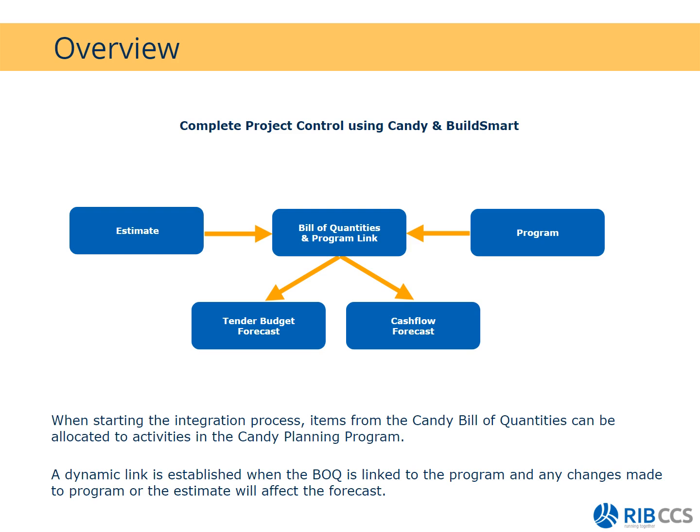I just have to point out though that on the estimate, if you go and adjust your final quantities, so let's say for Clearside, I had a total quantity of 1,000. I've adjusted my final quantity to 1,100. That means I will have an under allocation of 100. So you guys will just have to make sure that you go and redistribute that 100 so that the spread can be seen on screen.